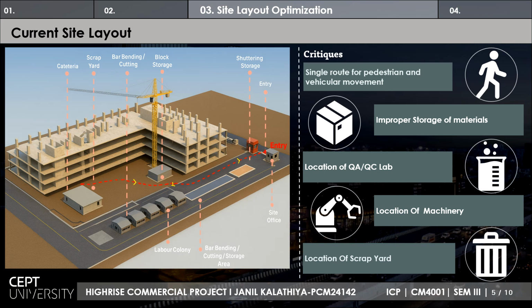The location of the QAQC lab was far on the corner of the site, which had to be changed for when documentation is needed. Also, the QAQC lab was far away from the concrete pump, so when material needed to be tested and a sample had to be taken, a laborer had to travel a long distance to get the QAQC equipment to take the sample.